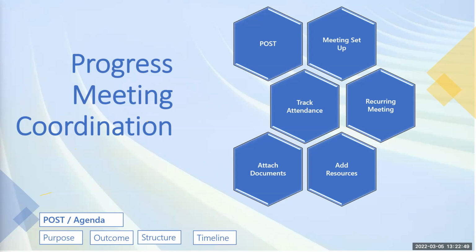So sometimes the actions need to be reviewed. Let's say it's a delivery review session or a progress status meeting where you capture the actions. It needs to be reviewed at the next session to find out what the update is. And as a PMO, prior to that meeting, you need to chase the people that have the actions. Oh, you got actions during the last status meeting session, checking what the status is. Do we have any update? Has this action been completed? Do you have anything to support the action? So you put a comments section into it and you use that.